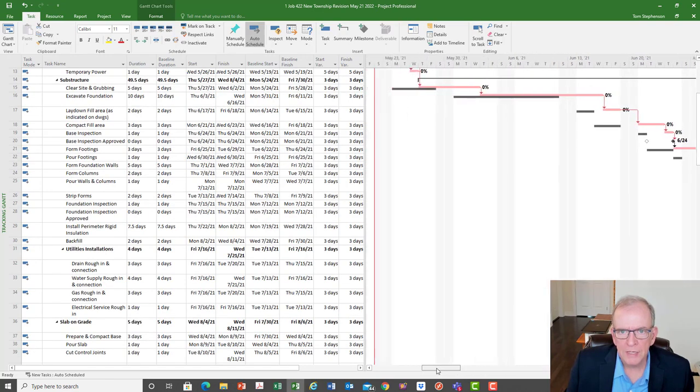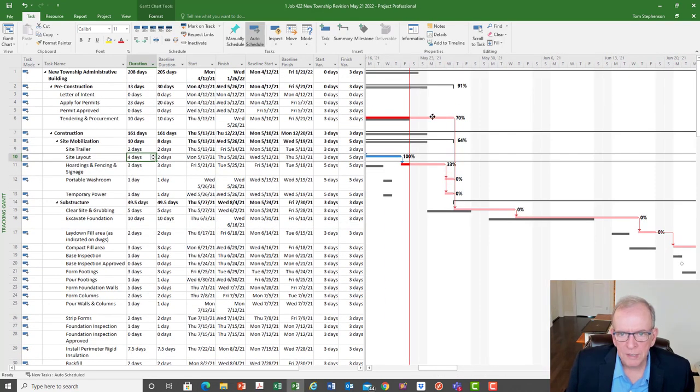But the idea is you detect along the critical path first. You try to fix whatever the problem is sooner rather than later. So the D is detect along the critical path. The I is look more immediately than later. Because if you take stuff out of the end of the project, when you get to the end of the project, it's got no flexibility. So better to fix it sooner rather than later.